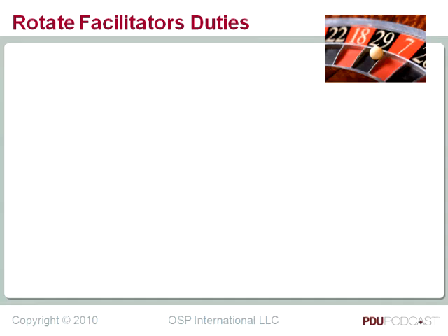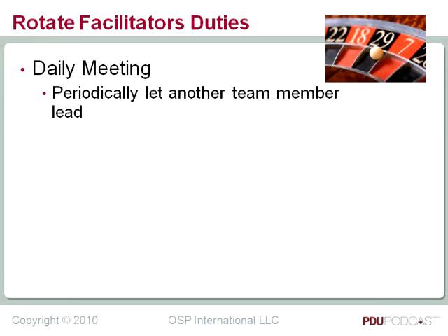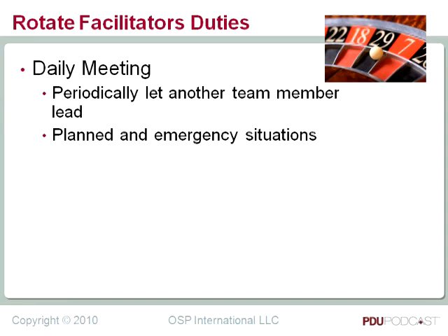So if you practice that by periodically letting somebody chair the meeting, which is much easier to do on a daily meeting basis, because there are so many of them. Many opportunities, yes. And you give everyone on the team a chance to conduct and feel what it's like and what needs to be achieved. So you do that periodically, and then when an emergency situation comes up, you can tap Janet or Phil, because they've done it before. They've done it before. Right.